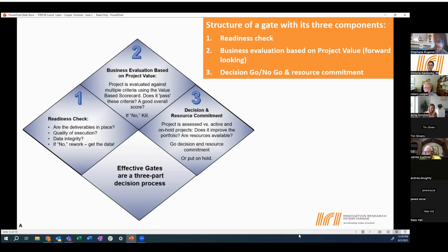There's actually a challenge that a lot of times companies have too many projects going on at the same time. You want to make sure you have resources available. Now, I'm not recommending doing portfolio resource management down to the detail, because with high uncertainty, experience is that you put in too much effort compared to the value coming out. But kind of small, medium, large, how much resources are we needing? Do we have those available? And do we have the right focus and commitment of those resources for this project before we move on? Yeah, next slide.